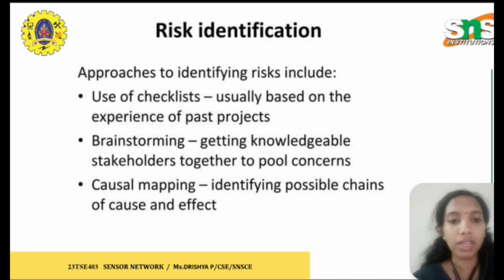Then brainstorming: getting knowledgeable stakeholders together to pool concerns. Then causal mapping: identifying possible chains of cause and effect to identify, overcome and monitor the risk.